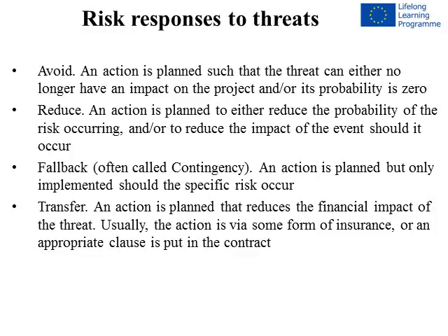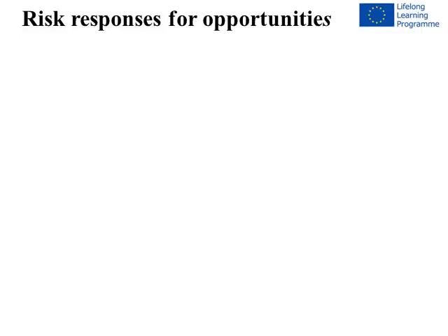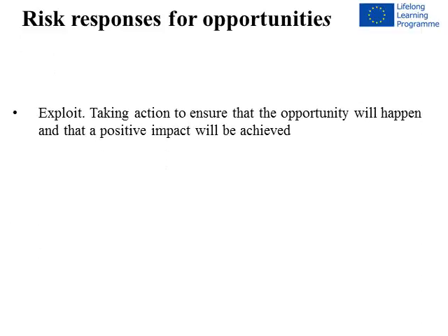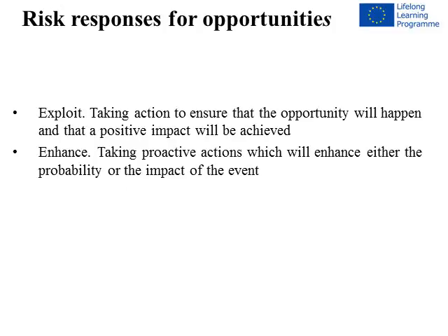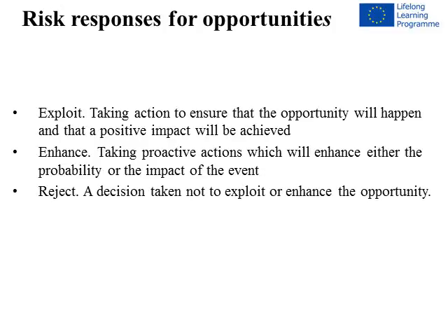Usually the action is via some form of insurance, or an appropriate clause is put in the contract. Accept. This is the take no action option. Risk responses for opportunities. Exploit. Taking action to ensure that the opportunity will happen and that a positive impact will be achieved. Enhance. Taking proactive actions which will enhance either the probability or the impact of the event. Reject. A decision taken not to exploit or enhance the opportunity.